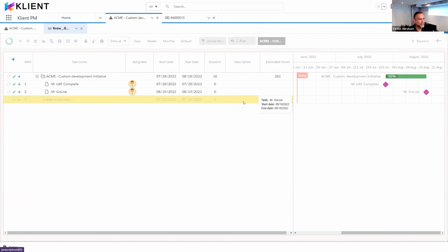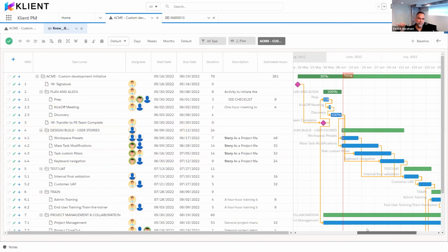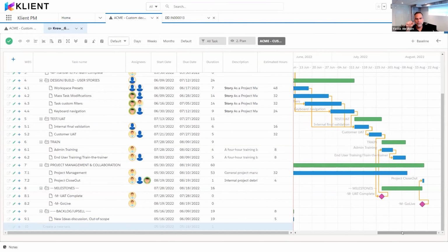I'm glad you took that milestone example, Dominic, because milestones are something that you should leverage a lot, because those are key dates within a project and everybody can align behind those dates. So the project manager can share it with their manager, but it's also the perfect overview to share with your customer or even your partner that's referring you the deal. So milestones are something everybody should be using. Everybody should be aware of modifications of milestone dates, and this should be part of a weekly review with the team. Milestones are great. And we'll come back to that.